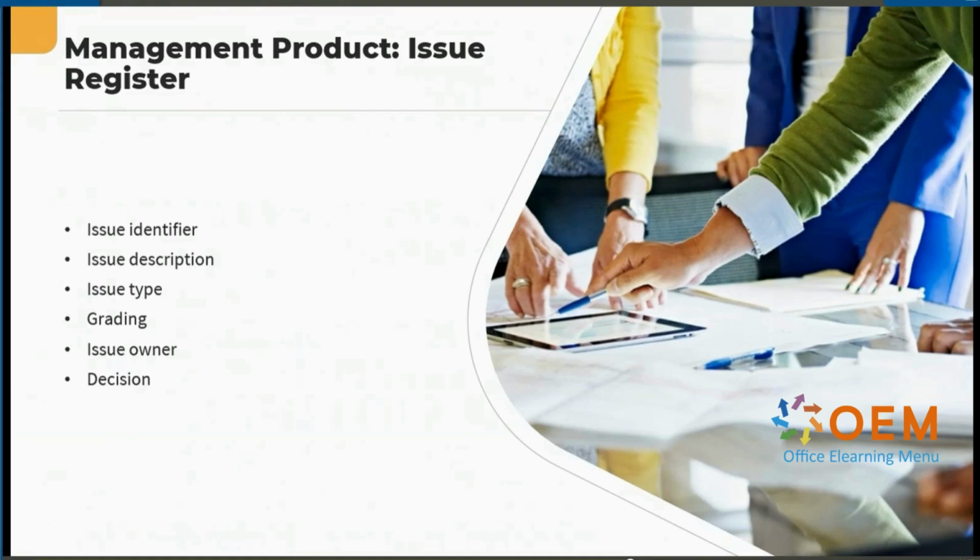For example, for an off specification, we could record that it was accepted and provide a summary of the concession made. We include the status. What's the current status of the issue? For example, is it logged, reviewed, actioned, escalated, resolved? And we'll include relevant dates related to the issue. So, for example, when was it raised? When was it last reviewed? Were there any action due dates? And hopefully a date resolved.